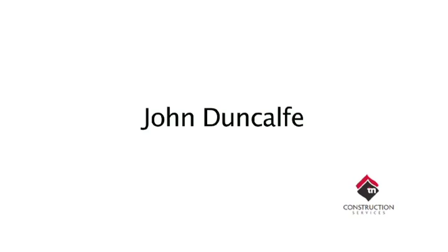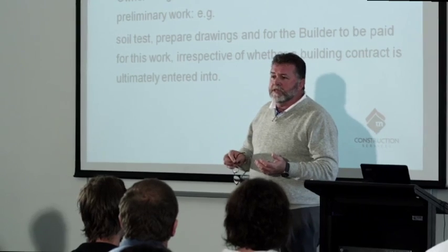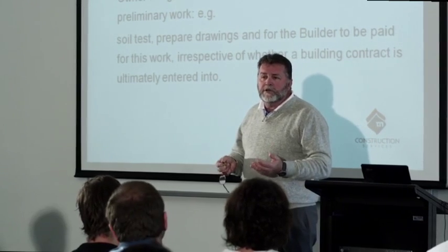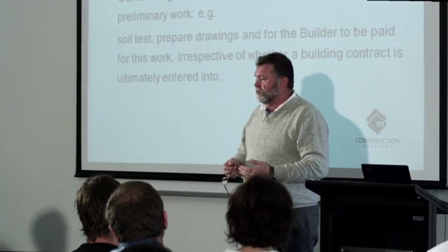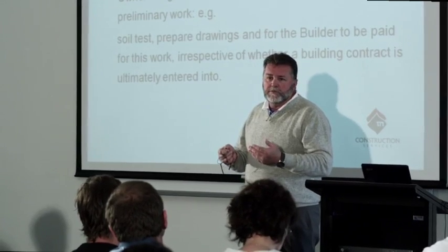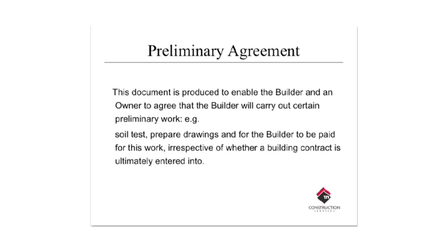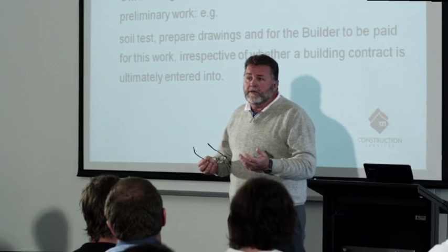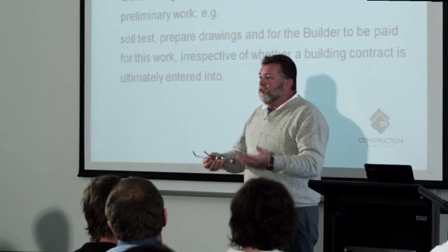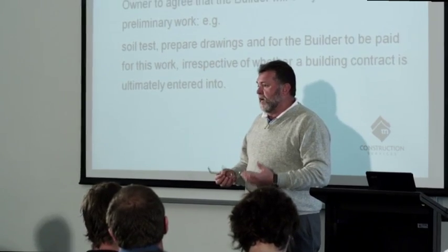Okay. What we want to do is explain to you about the preliminary agreement. Preliminary agreements are the forward part of any contract where you actually obtain information. As you can see there, relates to soil test or foundation data, preparing plans, engineering, could even be in relation to looking at getting a building approval. You actually get paid to do these tasks.